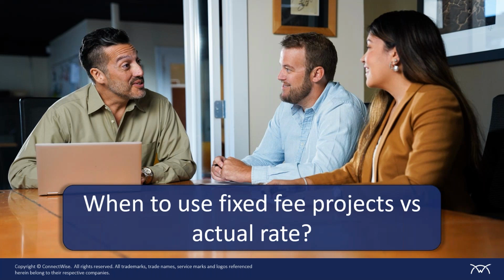And if we are entering our time accurately, we can get a good idea of how profitable the project was, and specifically how we forecasted it, in that scoping or statement of work building process, versus what we actually delivered. And that's really where the power of the work plan comes in, and why getting those budgeted hours set up to match what was sold is so important.